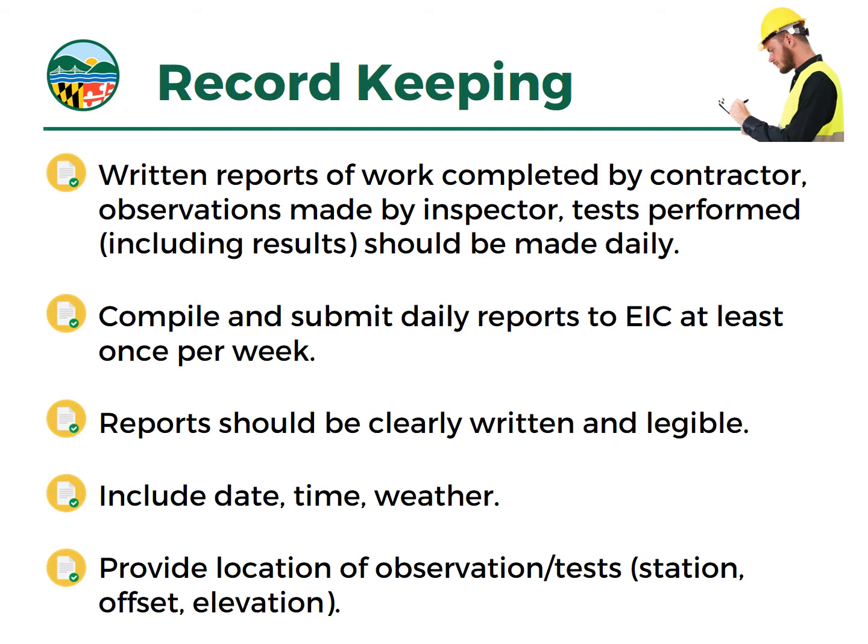All right, record keeping. Now, we had a conversation in our offices before this presentation, and one of my colleagues said to me, you'd be surprised at how important it is to remind people to keep records. You'd think it would be second nature, but it isn't always. So we do want to discuss a little bit about that. Clearly, we want and would expect from an as-built package and as construction is going on, written reports of the work completed by the contractor, observations and tests made by the inspection, and those reports should really be completed daily.